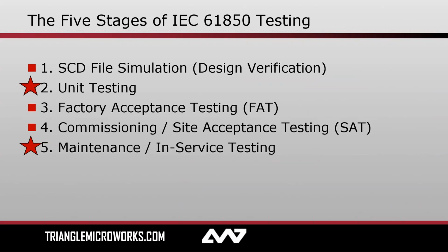Moving on to commissioning or site acceptance. This is commonly the first time that we have all devices co-located, physically connected, wired up, and available to do a complete system test. At this stage, I no longer need any simulation, and it's all about making sure that my completed and built system is behaving as expected, and it's largely validation.